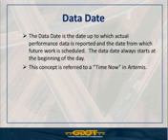So again, the data date is the date to which actual performance data is reported, and also the date from which all future work is scheduled. Typically in Primavera, you would see that represented as a blue line down the middle of your screen. And Primavera is very strict in that if you do not update a task when the project gets rescheduled, if you have not put an actual date on that task, it will be pushed out in the future, past the data date.